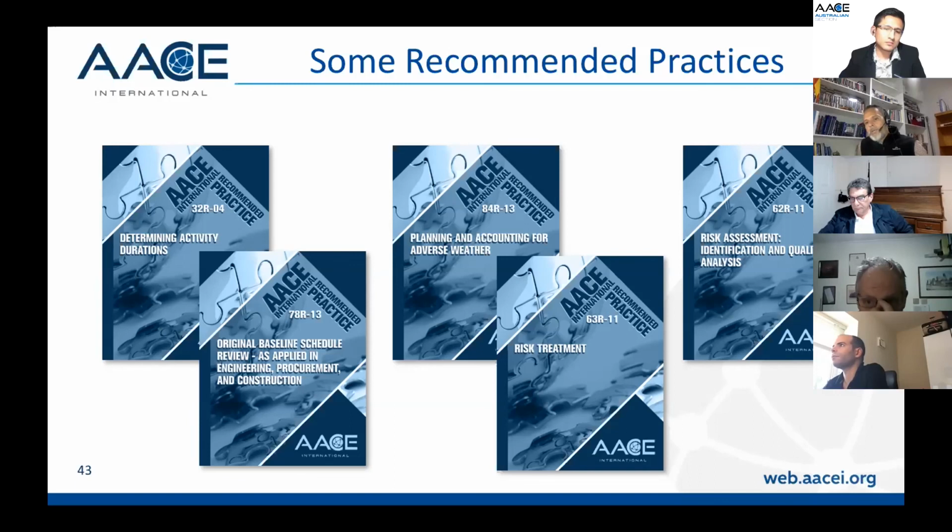And why are we doing this? Because the risk register is like your critical path. It's just changing and you need to update it. So let's say that you already completed all the site preparation; all the risks related to unforeseen ground conditions or relocation of utilities should be retired. Then you need to look at what risks remain or whether you have new risks in your project. So you need to keep managing the risk all the way along the project until completion.